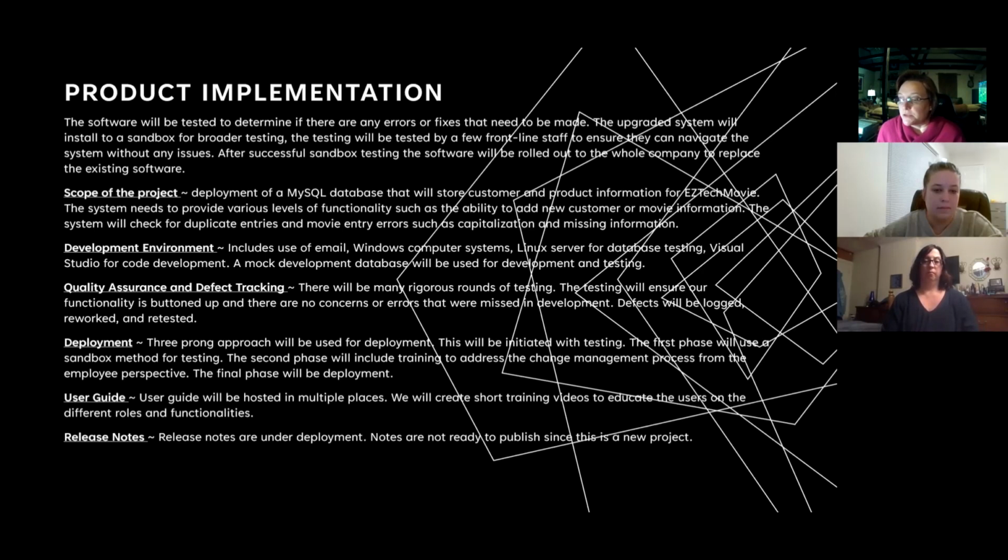The deployment will use a three-pronged approach. The first phase will be a sandbox method for testing. The second phase will include training to address the change management process from the employee perspective. And the last phase will be deployment. A user guide will be hosted in multiple places. Short training videos, no longer than 10 minutes, will be created to provide full detail while keeping employees engaged. Clear instruction prompts will direct the user when accessing or entering data.